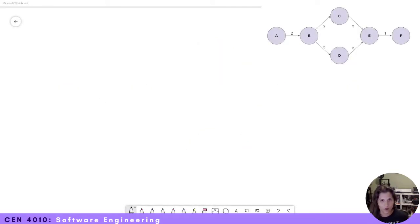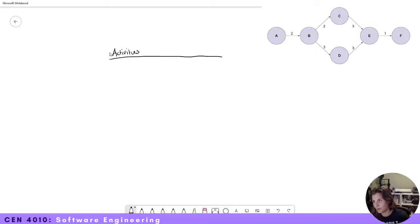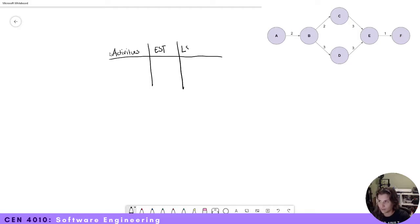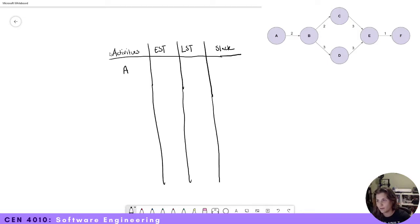As you can see in the top right, I have our activity graph that we are going to be finding our earliest start time, our latest start time, and our slack. So first, let's start by writing down our activities. We have our activities, and then we have the earliest start time, the latest start time, and then our slack. We're going to find our earliest start time first, then the latest start time, and from that we can calculate our slack. So we have A, B, C, D, E, and F.